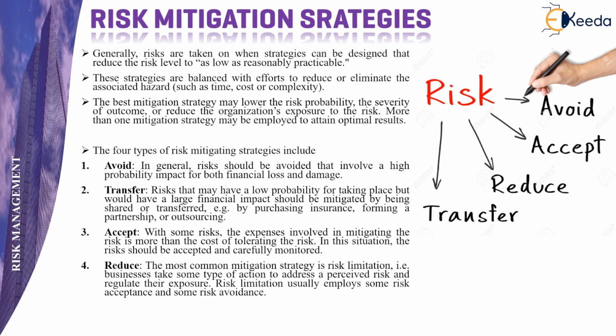Transferring the risk. Risks that have a lower probability of occurring but would have a large financial impact on the project can either be transferred or shared between a number of parties. That is, by purchasing insurance, you tend to transfer the risk.